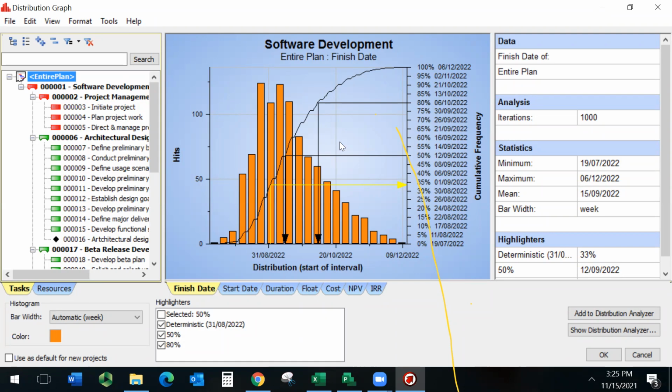Now, we talk about the key difference between the triangular distributions and the beta distributions. We will certainly not spend time talking about the two, but whenever you run an analysis, you can choose which distributions you are going to use. And again, the key difference is that the triangular distribution uses a simple average, and the beta PERT distribution uses a weighted average, giving more weight to the most likely number.